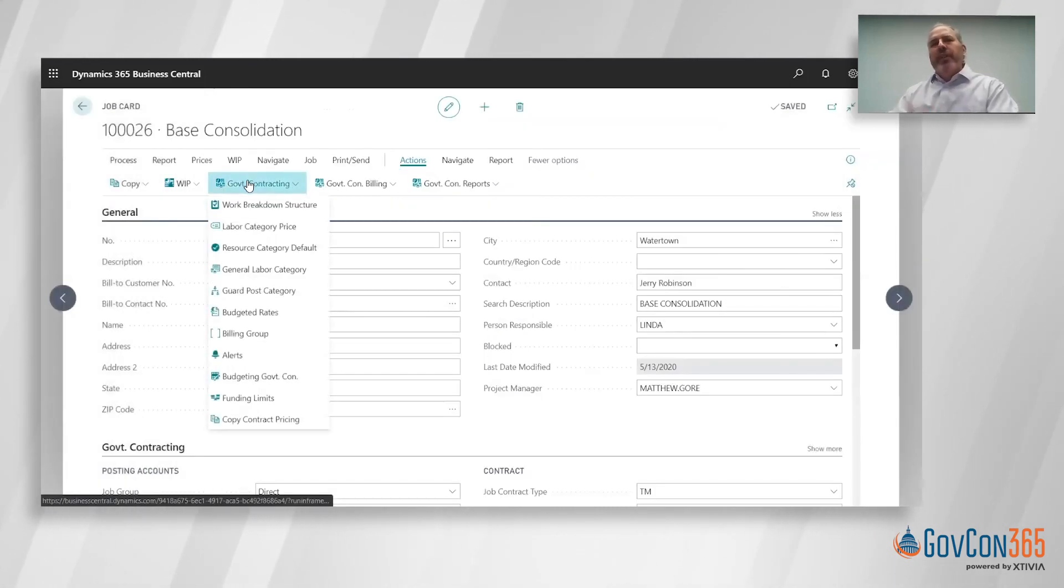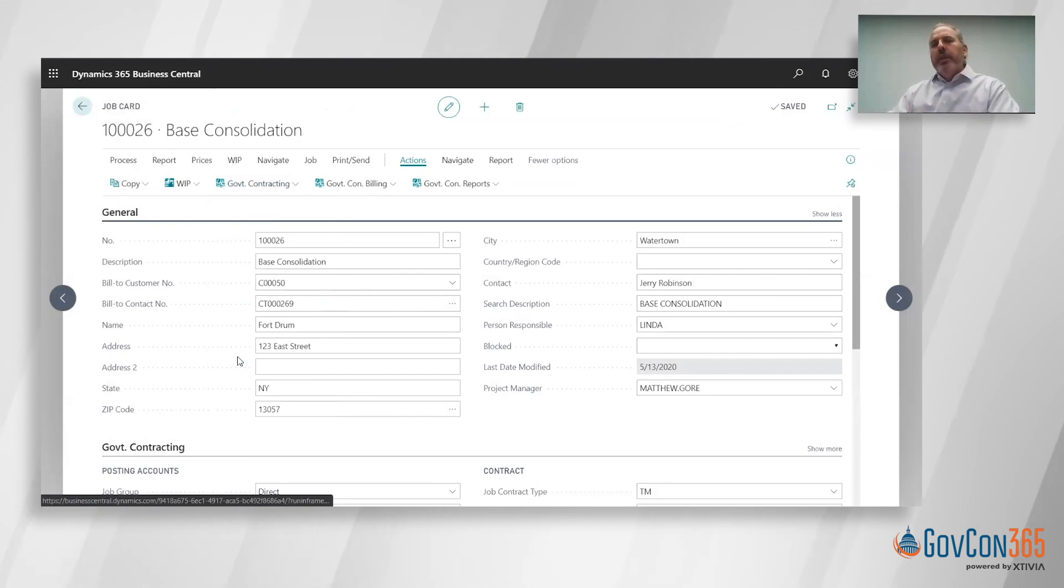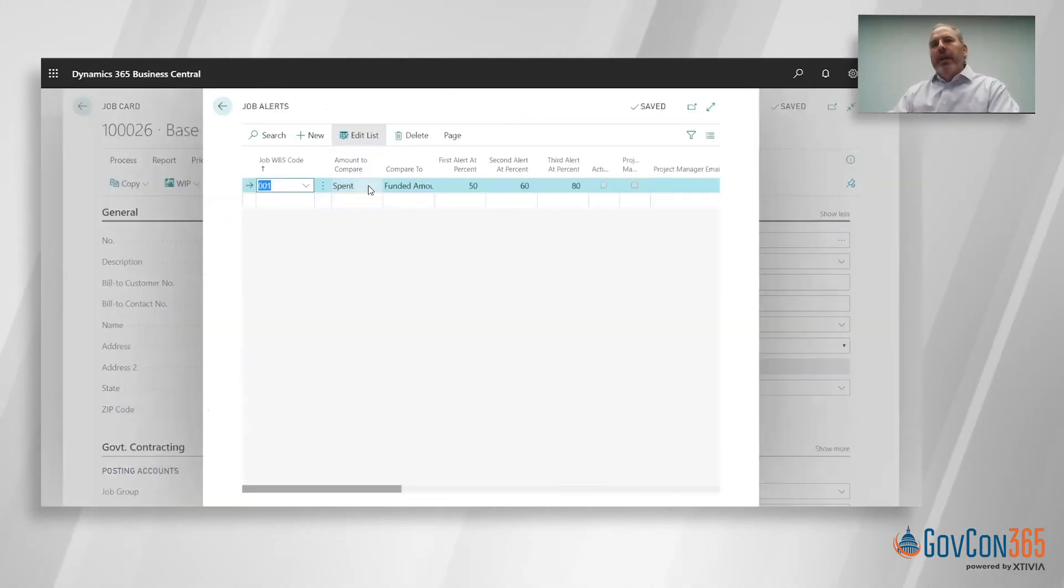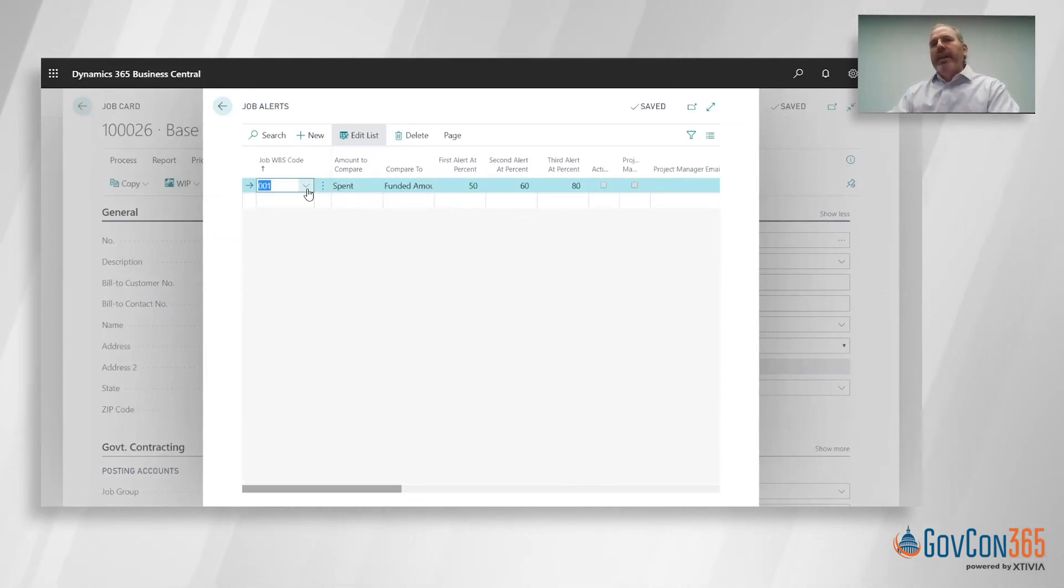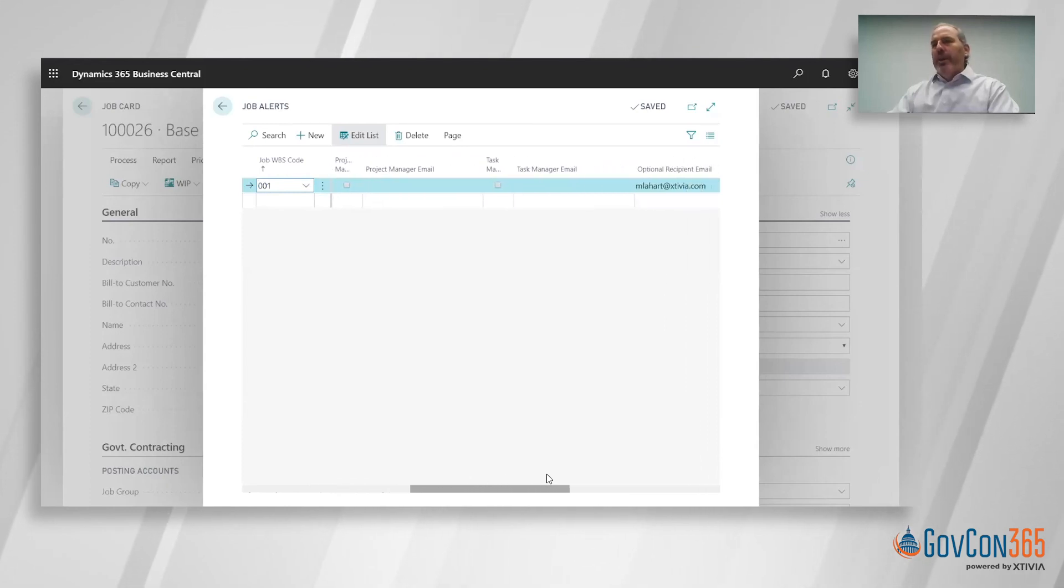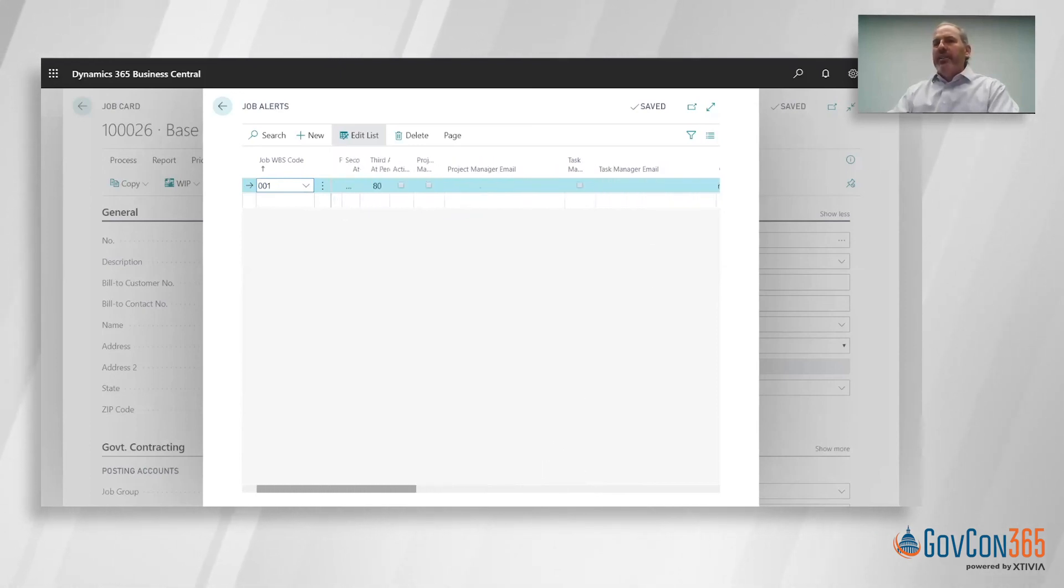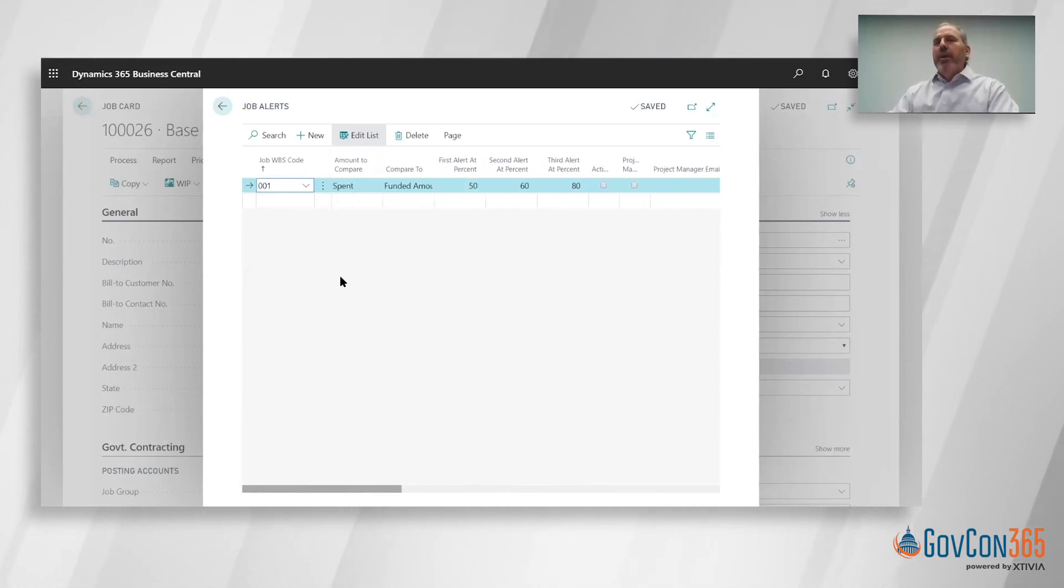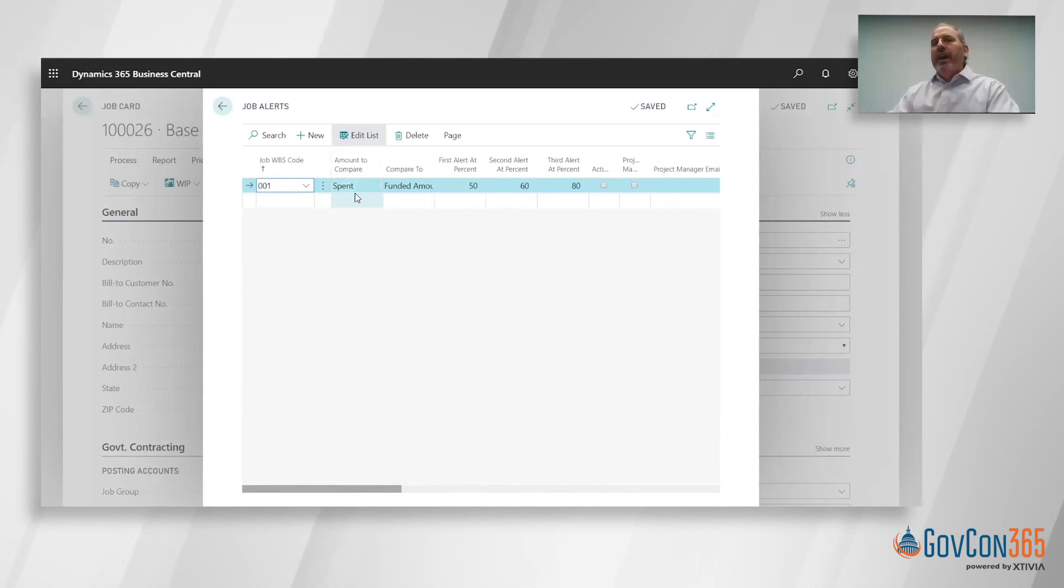Just some other general things about the setup here. We have the ability to set up alerts. What alerts provide is the ability to compare what's been spent or billed to what's funded or budgeted. This can be done at any level of the WBS, and you can trigger an alert at a certain percentage. That alert can go out to a project manager, a task manager, or you can just hand key an email address in there. Maybe you want to go out to your client potentially to notify them that that task just hit 50% of funding used as compared to what we've spent. Really a great way to manage that and be notified versus having to run a report.